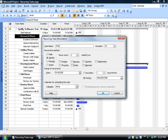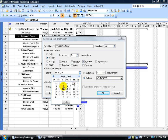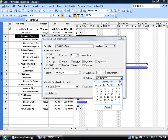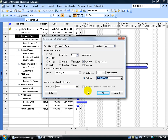The dialog will ask a few questions. The name of the task is Project Meetings. For duration, not one day — type '1H' for one hour. Remember: D for day, MO for month, M for minute. For the pattern, it's going to be Weekly, every Tuesday. If you want it every other Tuesday, bump the recurrence to every two weeks. Then down below, set the start date — we'll choose the first Tuesday after our project begins on August 1st — and end by October 28th.